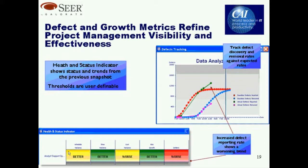There are lots of concerns about metrics. If you can't measure it, how do you know about it? There's a great book called How to Measure Anything, and you can measure most things. But if you don't measure it, how do you know? Is your software project on time? Is it being developed properly? Are the defects being removed? The basic measurements for a software program — the obvious ones — are size: how much stuff you're building, whether it's function points, use cases, lines of code, or whatever. Time: how long it's going to take to develop the software, and also during maintenance. Effort: how much work is involved in performing the tasks. Complexity: how difficult the tasks are. And the number of defects inserted and removed. Those are the basic and obvious measures.